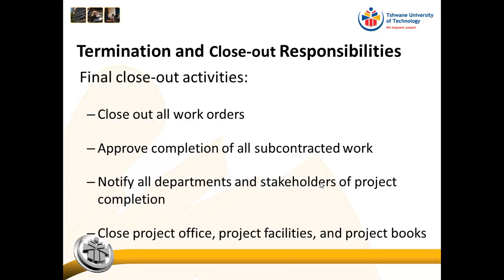If you have subcontracted work, you need to approve it and pay the subcontractors. Notify all departments and stakeholders of project completion — sometimes people continue booking on your project because their functional manager has not been told it is complete. If there is a project office or project facilities, you need to close those down. Your project books must be updated and all information filed, whether in physical or virtual files, available to other project managers as part of the organization's knowledge assets.